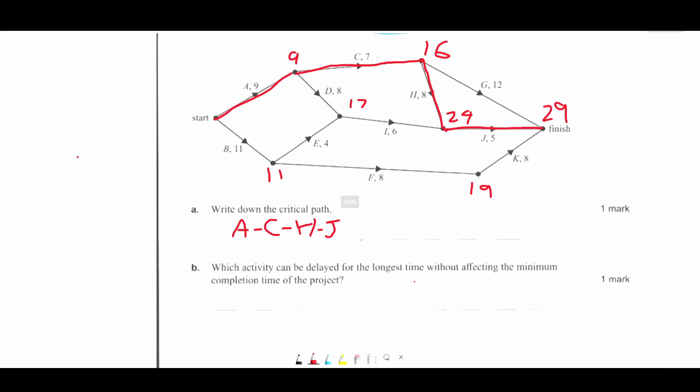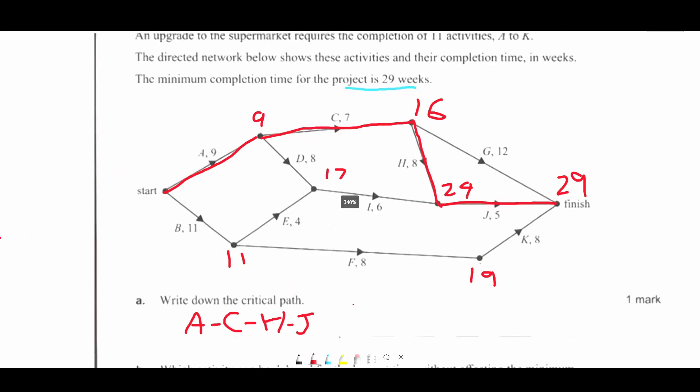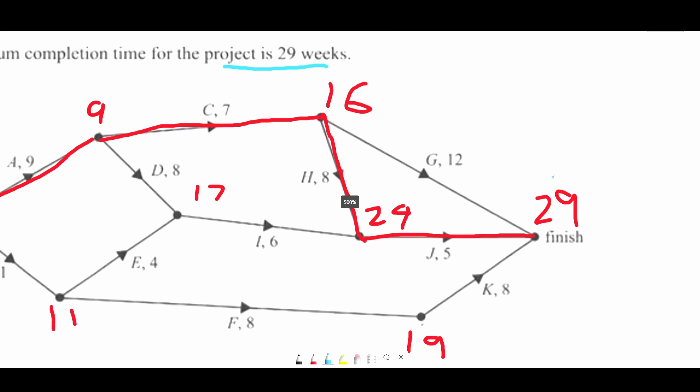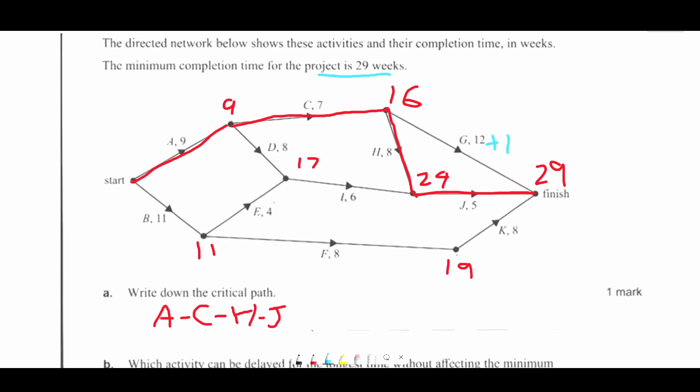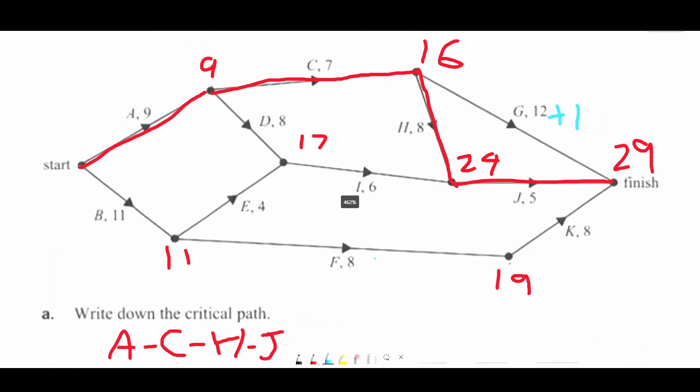Which activity can be delayed for the longest time without affecting the minimum completion time? Well, obviously it can't be anything on the critical path. So we're left with these bottom activities here and then these middle activities here. If we look at the length, this is 8 and this is 5, which equals 13. So this could technically be delayed by 1. Down here, this is 11 and this is 8 and this is 8. So 11 plus 16 is 27. So realistically, these two things can be increased by plus 2.